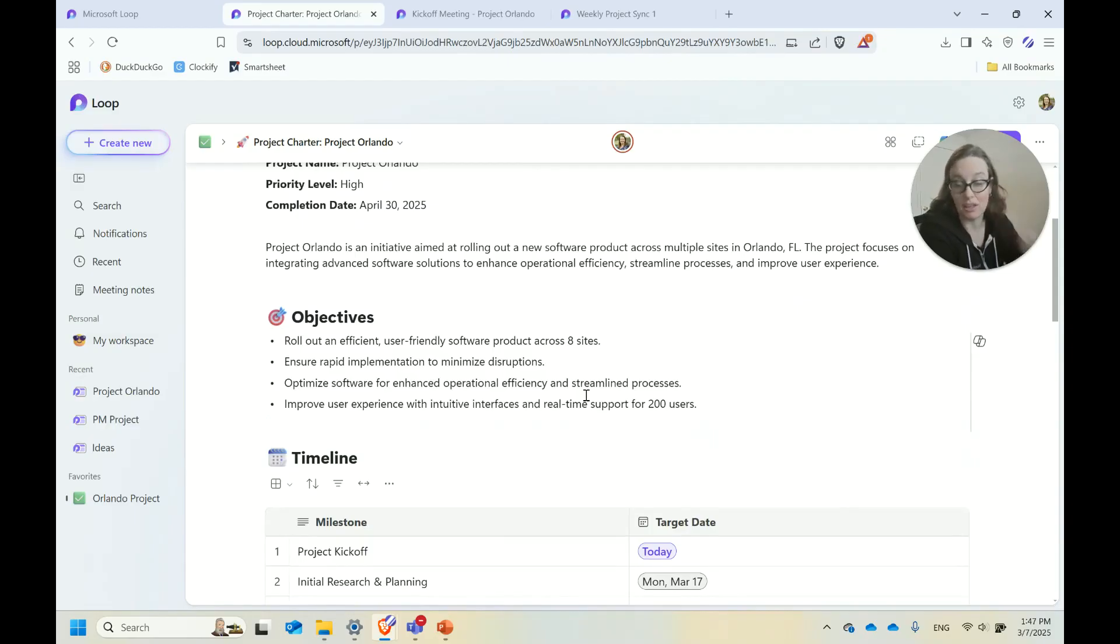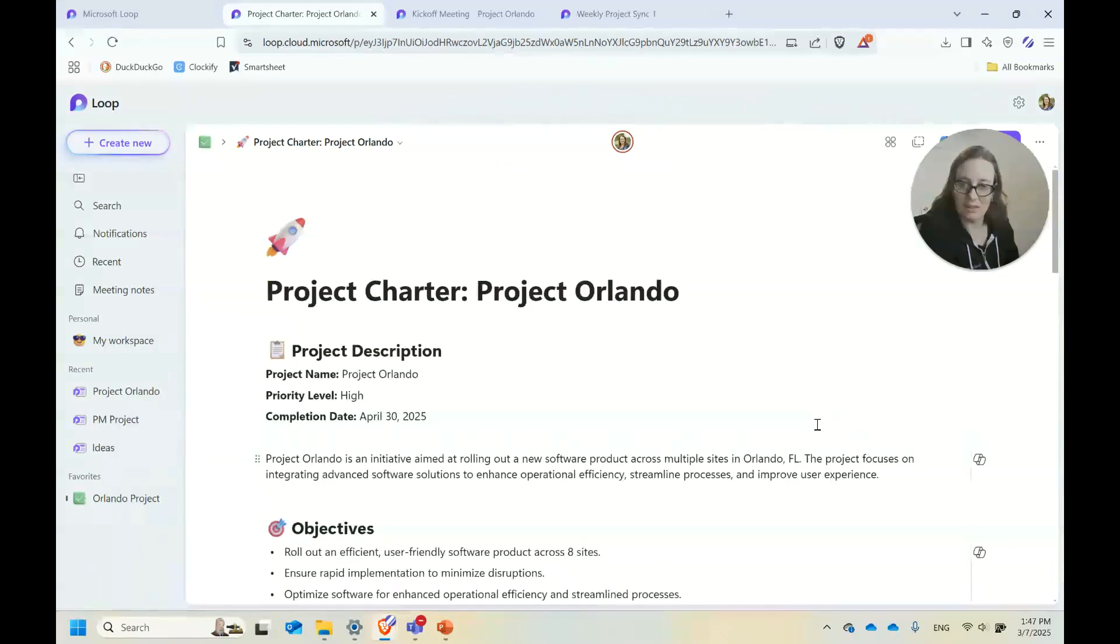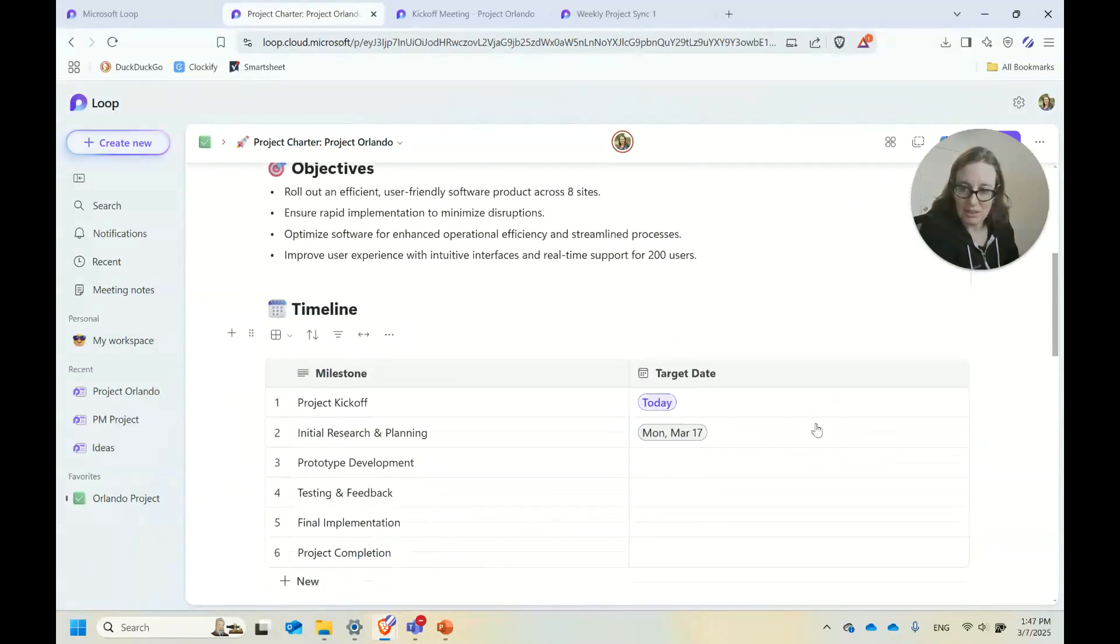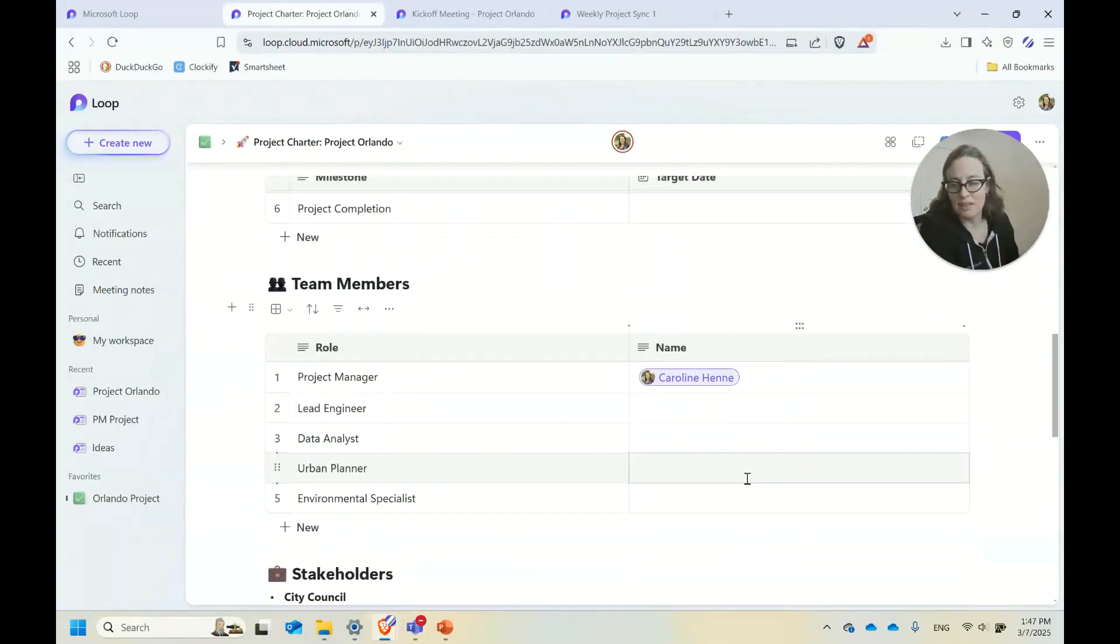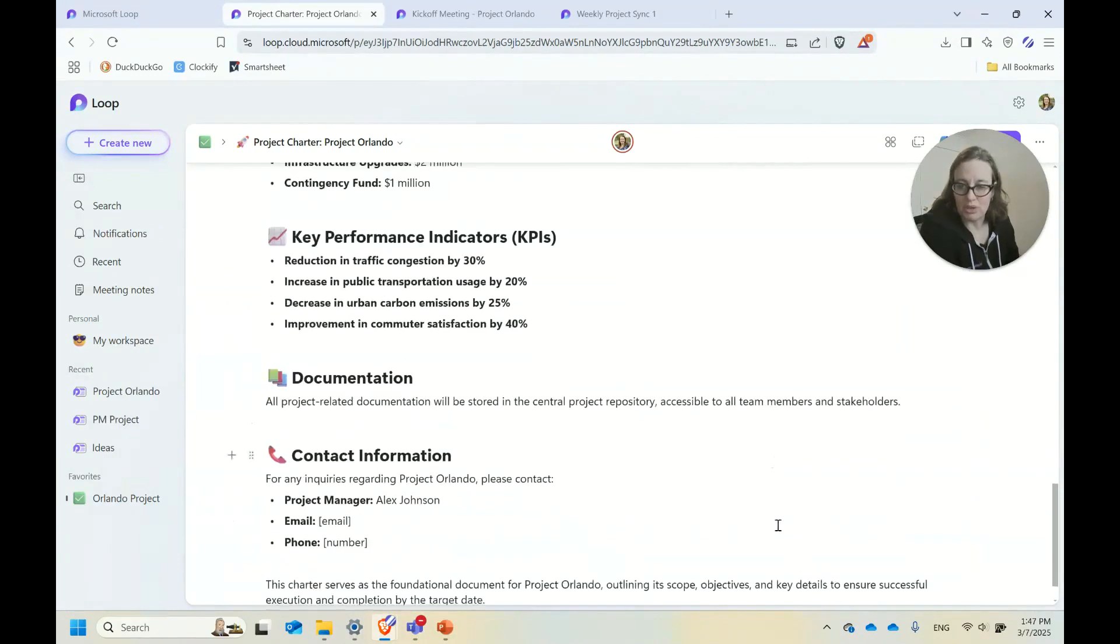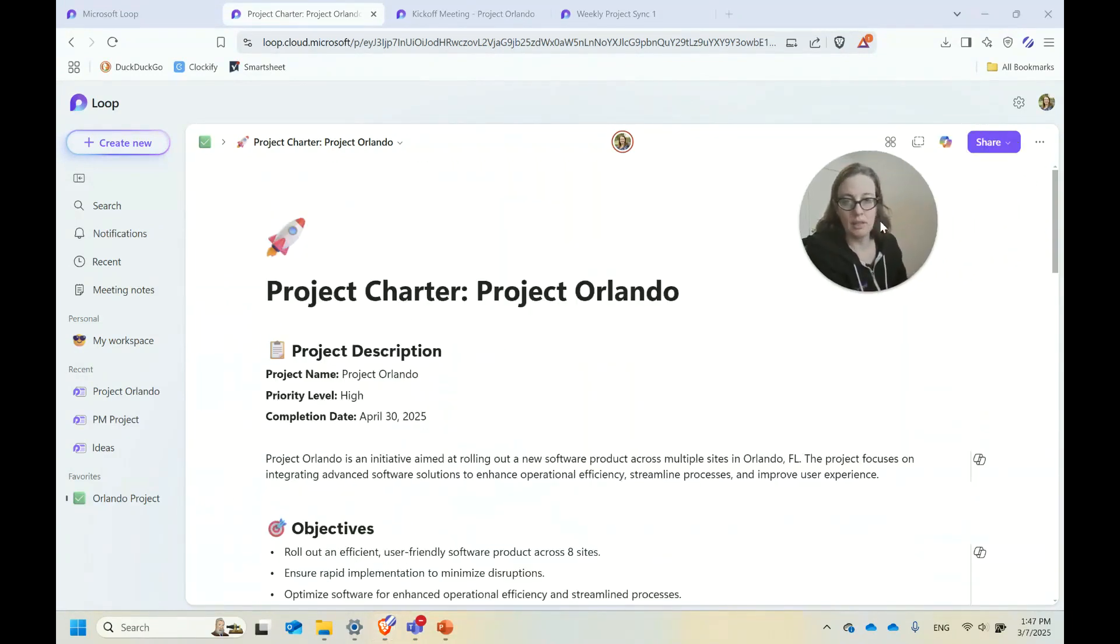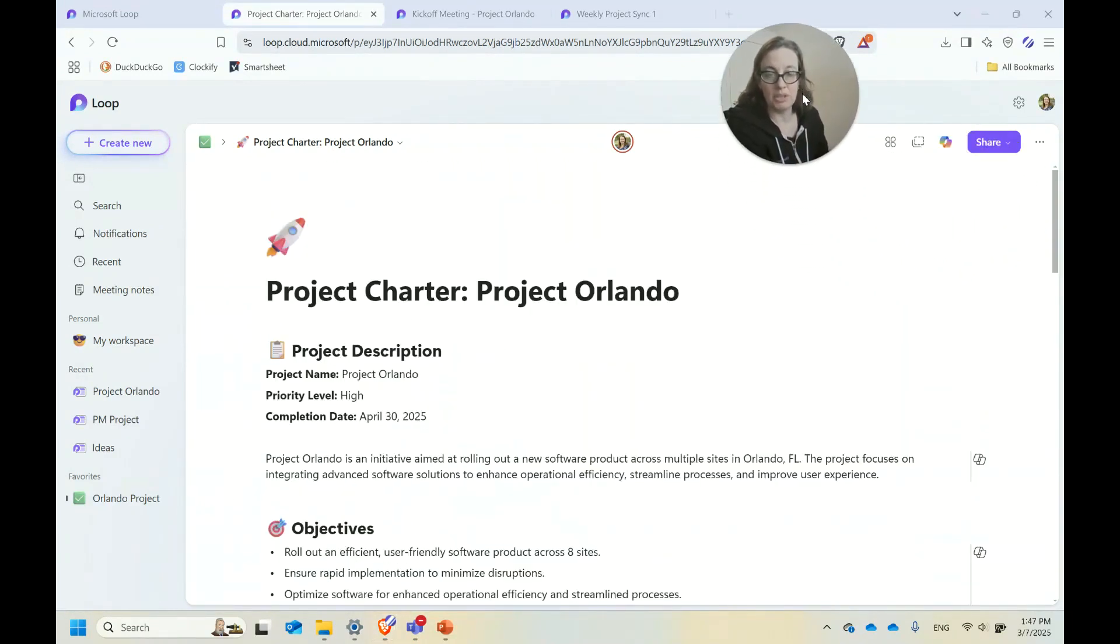I would pull this up at a meeting, at a project kickoff, and make sure we're aligned across the team around all these different pieces of the project itself: timeline, team members, stakeholders, and budget. So informational pages can be really nice to have in Loop.